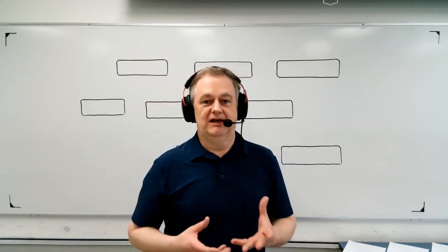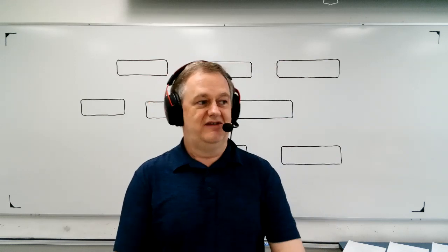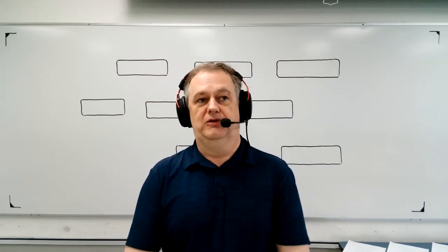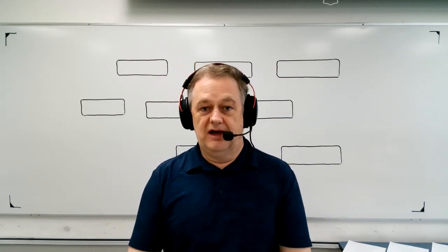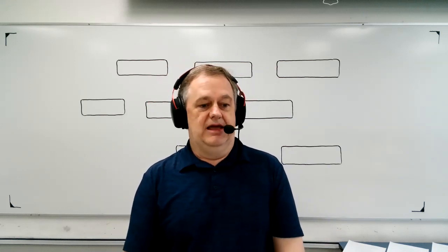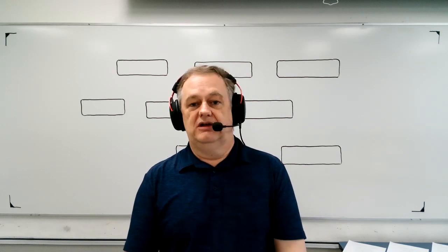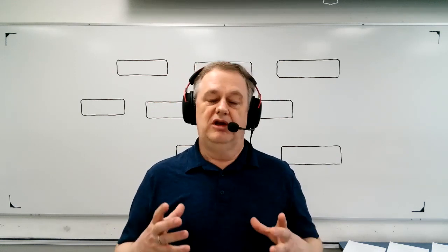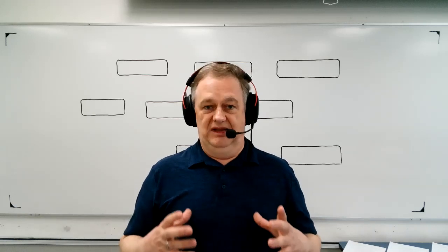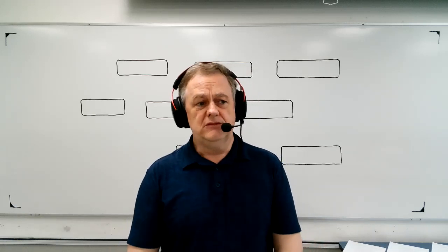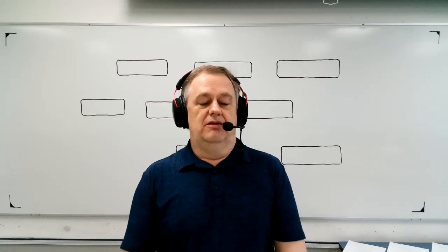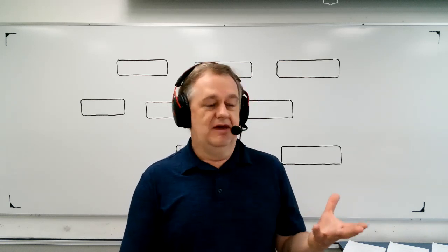Now, when the client or the owner, say whoever has the idea, decides that they want to build something, what they normally do is they're going to contact an architect, and what the architect's job is to do is to take the ideas that the owner describes to them and put it down into a plan. And we call that plan a concept or a preliminary plan. And then he can give that back to the owner.